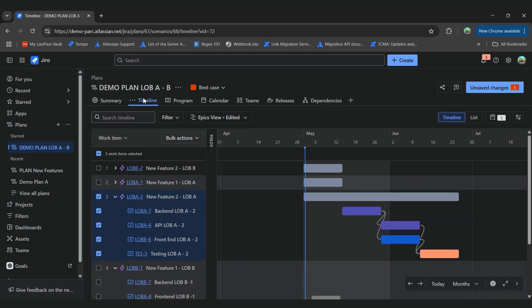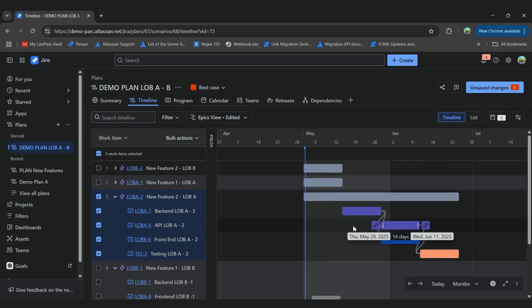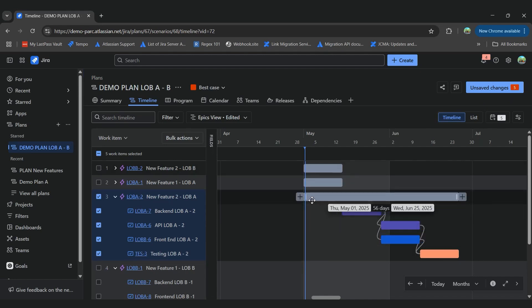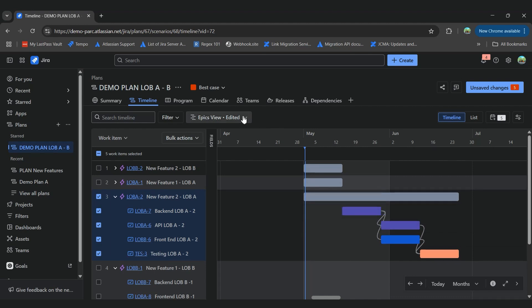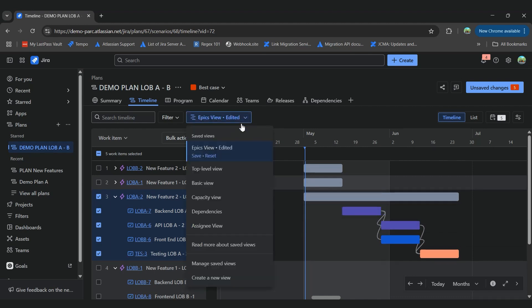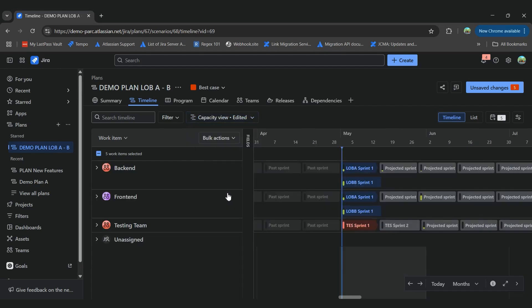And remember, until we save the changes in our plan, those changes won't be committed to our Jira work items. So here, we see that despite that our epic starts the 1st of May, our first task will be starting the 12th of May. That might be due to some capacity issues.